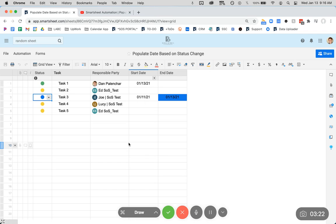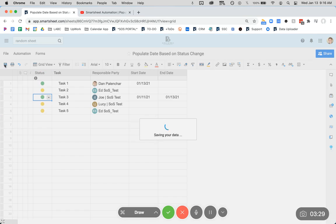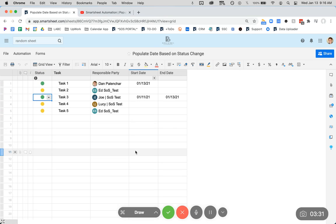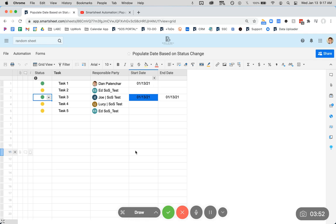Now, there's maybe a potential kind of flaw as this is currently set up. So if this now gets changed to green, every time an applicable change is made that triggers the automation, it will overwrite whatever date is currently in that field. So our start date is now going to get replaced, which depending on the workflow, it might make sense if you're, for example, kind of starting and stopping tasks, but that's not too typical.